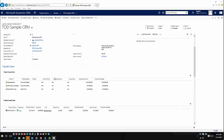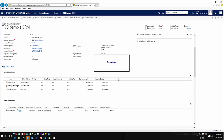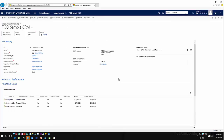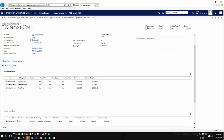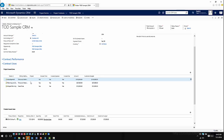The next part is to go out and create what's called a project contract. A project contract is really just an order that has project-based information associated with it. So if I take this quote and close it as a won quote, this will do the same thing that CRM functionality has always done — it'll go out and create the order associated with this. This order is also what is considered a project contract and will have all of the contextual-based information associated with it. Now I can come in here and see that within this order information it has my project information associated, bringing in all of my individual project lines and contract lines. Within these contract lines, I can start associating them with specific projects within the application.